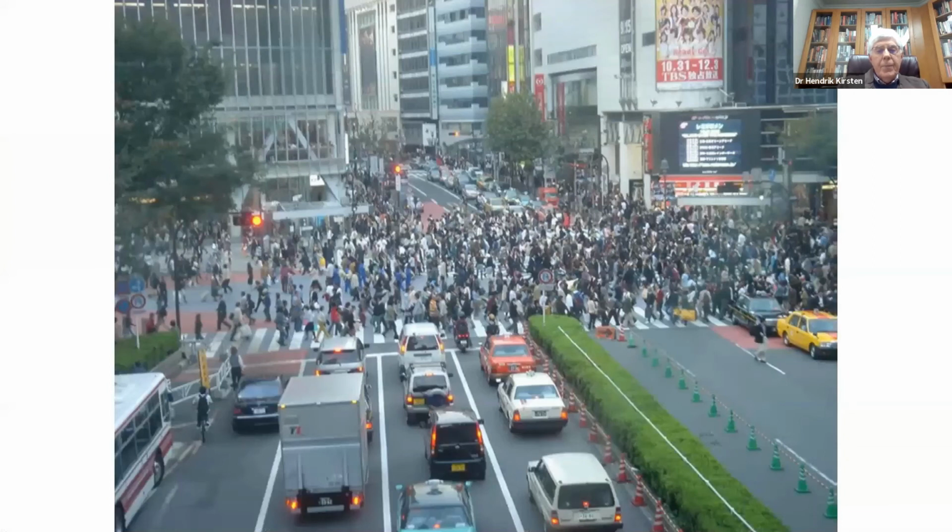is what you find in a city center, where you have the potential occurrence of risks in the public spaces in the city center, and you can see pedestrians that may be affected. You can see people in motor cars, you can see people in larger vehicles and buses. And these are exercises that we've actually done. It gets a little bit more complicated, but again, it's a combination of the frequency of occurrence of sinkholes and the consequence. You can see when you've got so many people in a public space that the consequence is actually quite severe, and therefore the likelihood of a sinkhole occurring needs to be very low.